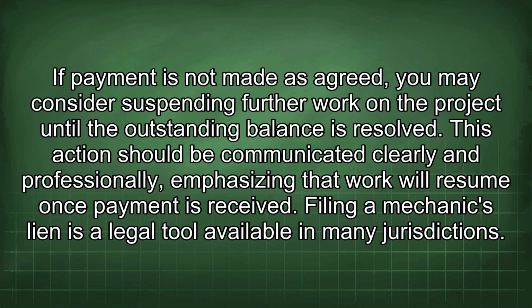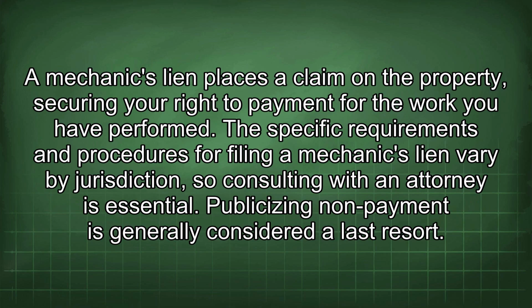Filing a mechanic's lien is a legal tool available in many jurisdictions. A mechanic's lien places a claim on the property, securing your right to payment for the work you have performed. The specific requirements and procedures for filing a mechanic's lien vary by jurisdiction, so consulting with an attorney is essential.